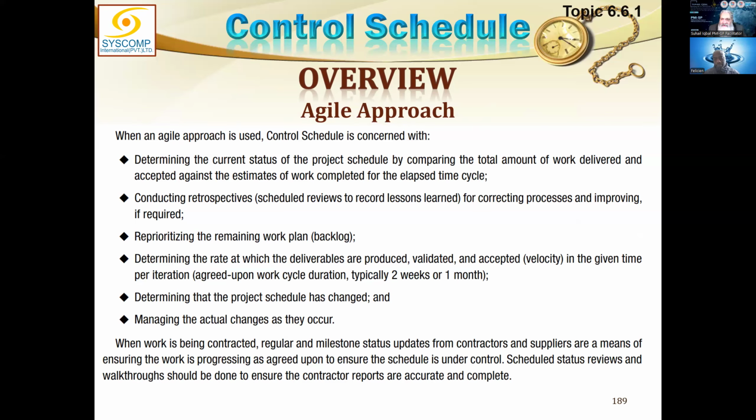In a predictive project, when the project ends, we do the lessons learned exercise, and that is of absolutely no use to the current project, but may be useful for future projects. Here we are fully making use of what we learn. In this iteration we learn a lesson, and we use it in the next iteration, and that way we are capable of continuously improving.